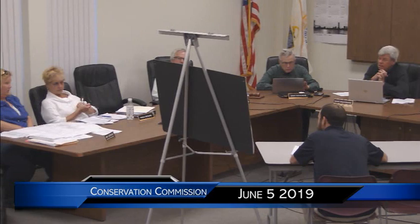It'd be unusual, I think, for a project like this to vote, although I think you can have some assurance that we don't really have any outstanding issues. But at the same time. We couldn't close it. The orders wouldn't have been done till next meeting anyway, so the permit wouldn't have been out. So what I can do is, we can continue to the next meeting, get the plans, and then maybe even if everything looks good, you could probably even do the orders that night. So it's not going to add any more time to the project.